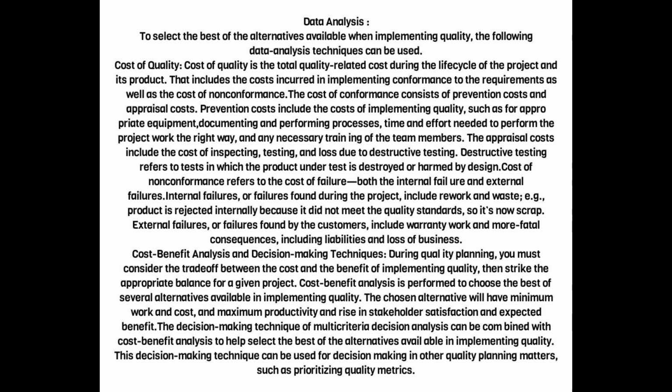The decision-making technique of multi-criteria decision analysis can be combined with cost-benefit analysis to help select the best of the alternatives available in implementing quality. This decision-making technique can be used for decision-making in other quality planning matters, such as prioritizing quality metrics.